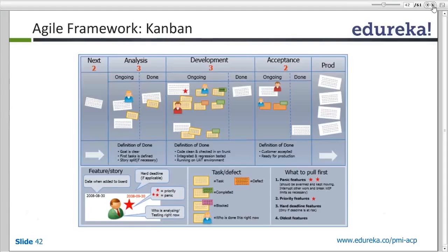I will make a hard stop at 5. We decide on a limit at the beginning of the project, say 5. So at the point where I have 5 tasks in my in progress section, I will halt, complete the in progress ones, move them to done, and then start a new one. This is called work in progress.